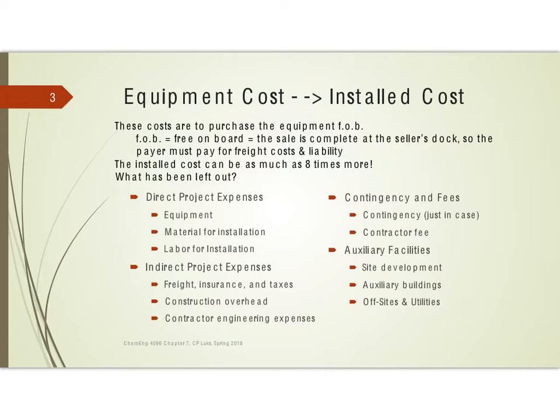The price quoted will be FOB. This isn't like Amazon Prime where they're just going to ship it to you at no cost. FOB means once they shove it out their door, it's yours. So you're going to have to pay for all the freight costs. If there's any liability insurance you're going to need to cover that shipping, all of those expenses are yours.